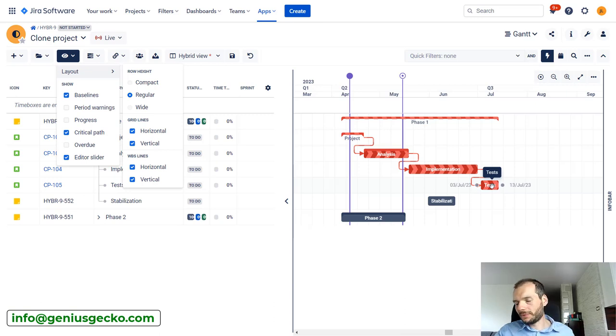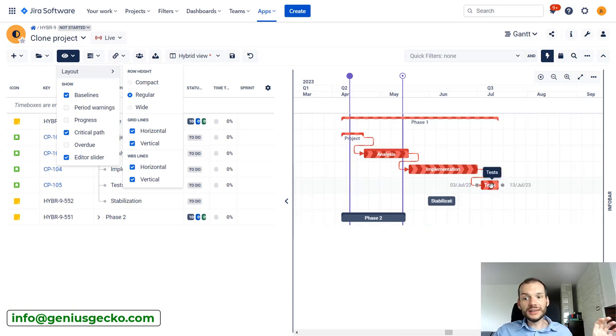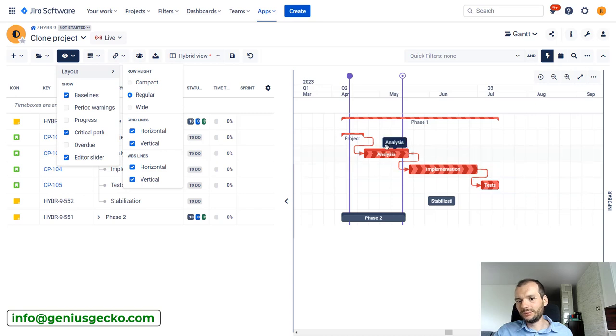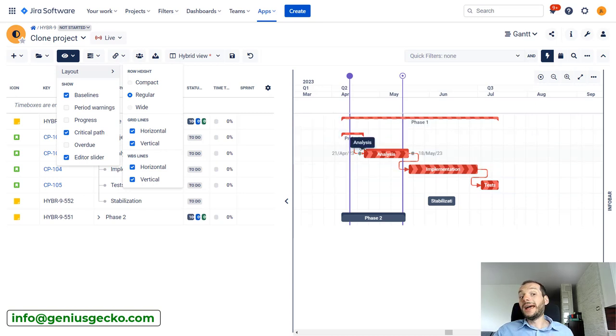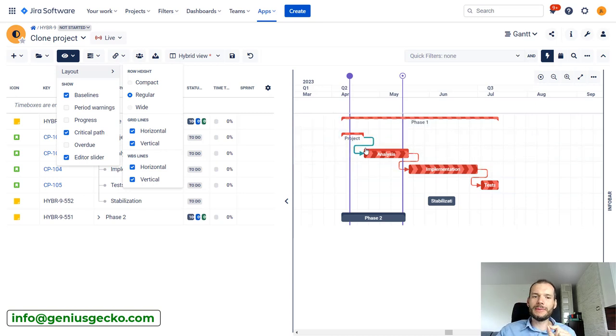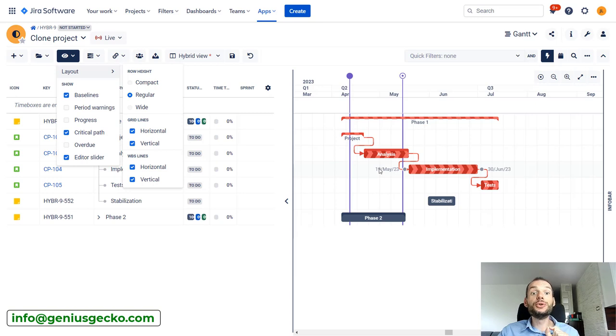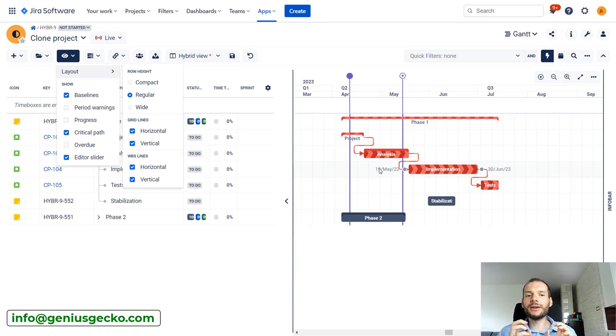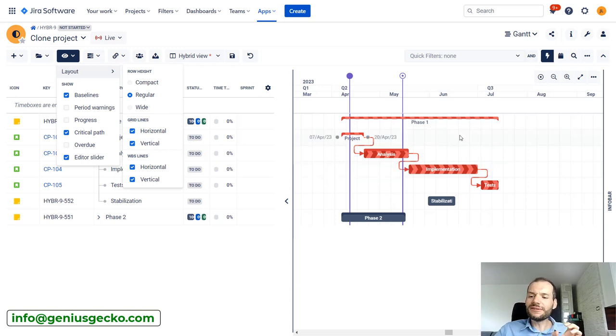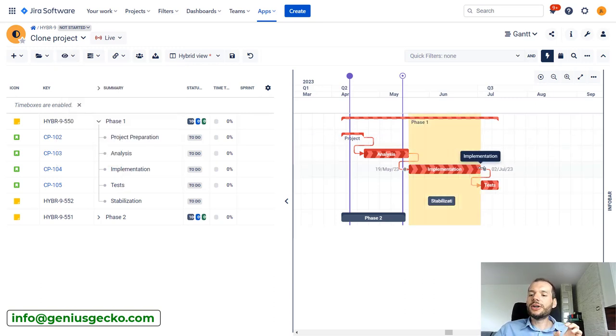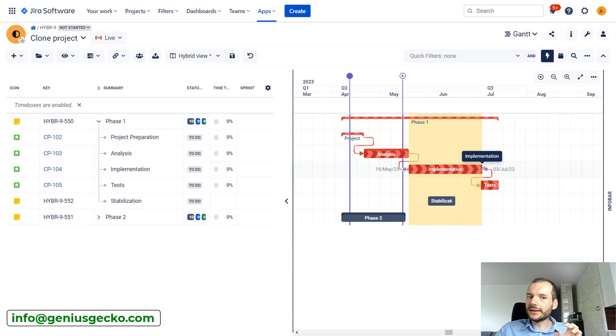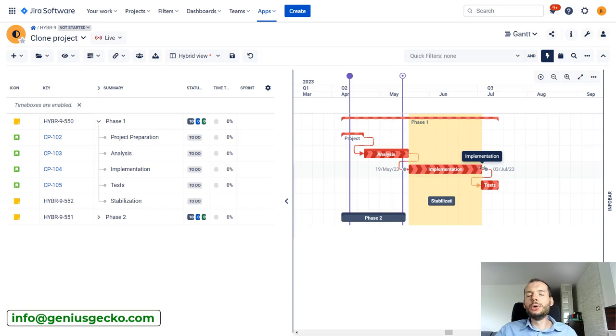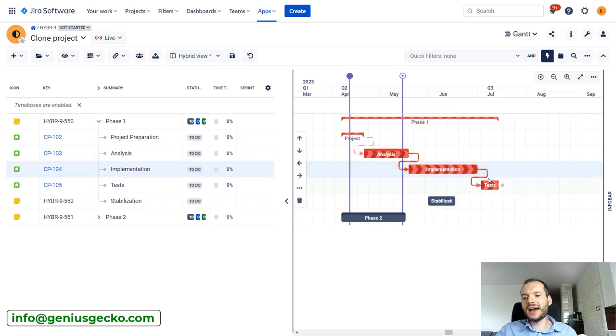Now all the tasks that have dependency with this one can be marked also as being on critical path, but do not have to be. When they are marked, they are marked as being on critical path if delaying their delivery by even a single day will move the last task on the timeline.